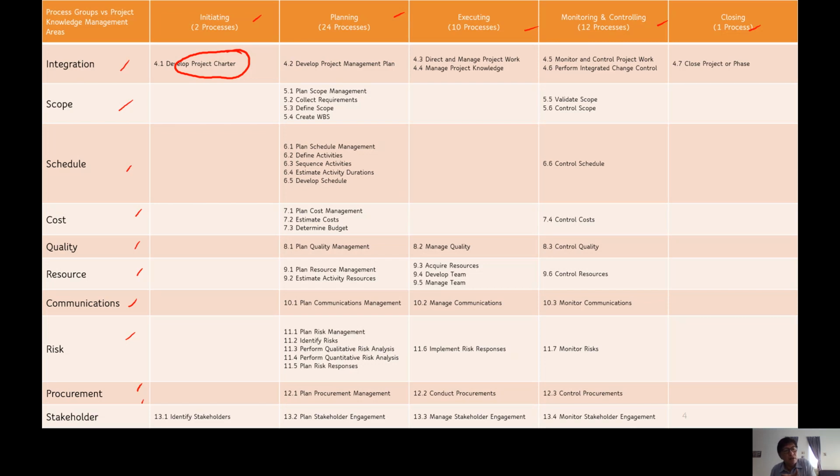Okay, we make our adjustments. So there could be what we call change requests. In construction, they call it variation order, VO. Even if we have change requests, we have to go through a formal procedure of having a change control board. In some institutions, they call it a steering committee or a change committee, whatever it is. But as far as the Project Management Institute is concerned, they call it the Change Control Board, CCB.